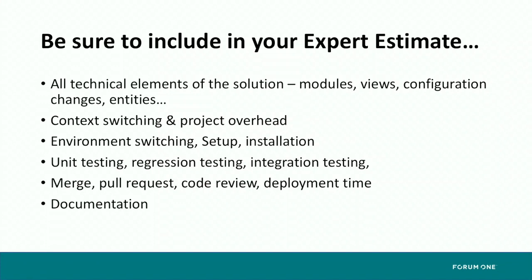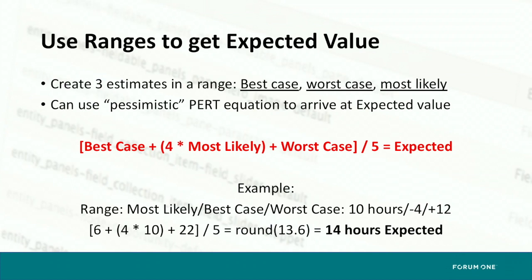So coming up with a number for a feature or a story is not so easy and not so hard. It's not so easy in that you can't just say it's going to take this amount, and it's not easy to come up with an accurate number, but it's not that hard either. You come up with a manifest of what you're going to create. You come up with a work breakdown structure, which can be a simple list of the results that you're trying to accomplish, and you associate estimated costs with those items. You add up those estimates, and you get your rolled up software estimate.